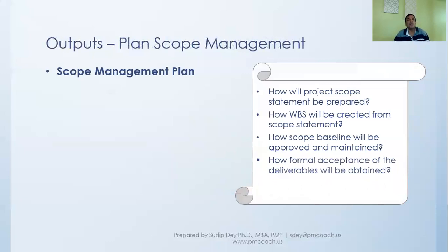For example, once we have done the deliverable, what kind of steps will be taken for the user to actually validate the scope, who will probably be involved, how they will come about and how they'll measure to see we have delivered, and what processes will probably be involved in actually accepting that, because there has to be a formal acceptance of the deliverable, if you remember, before closing the project.